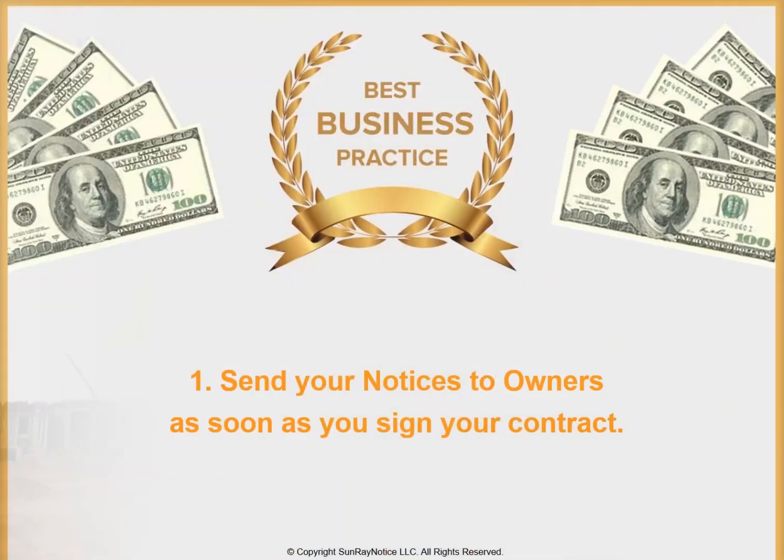So the best business practice is to send your notices to owners as soon as you sign your contract. It is the best business practice to have. You know that you are within your 40 days. You do not have to worry about the concerns of, did the owner receive it by the 45th day? So the best business practice is to send the notices to owners as soon as you sign your contract and not wait.